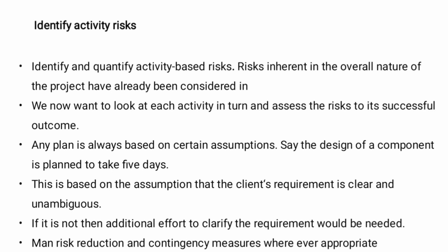Any plan is always based on certain assumptions. Say the design of the component is planned to take 5 days. This is based on the assumption that the client's requirement is clear and unambiguous. If it is not, then additional effort to clarify the requirement would be needed. Plan risk reduction and contingency measures wherever appropriate.